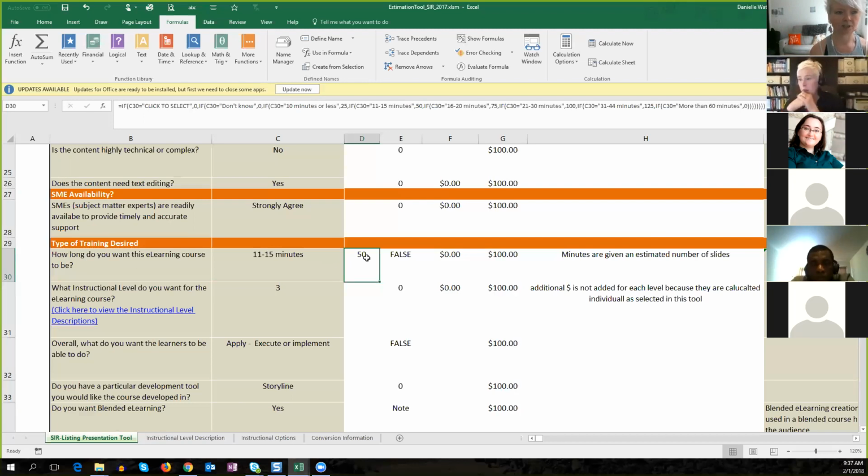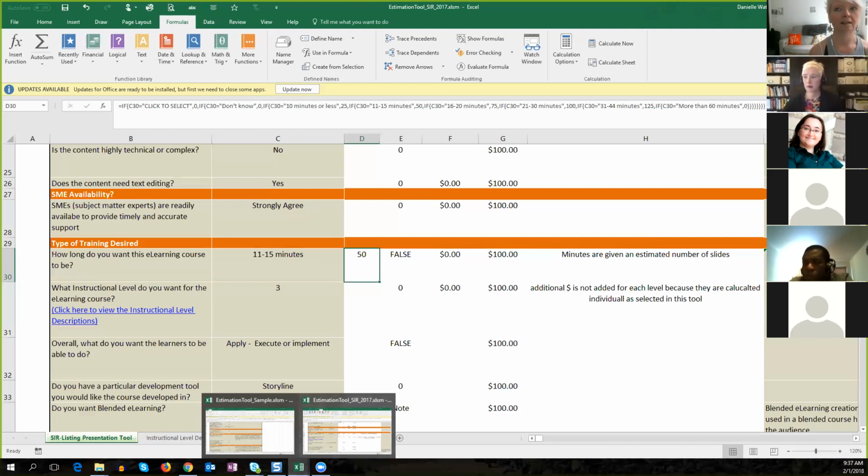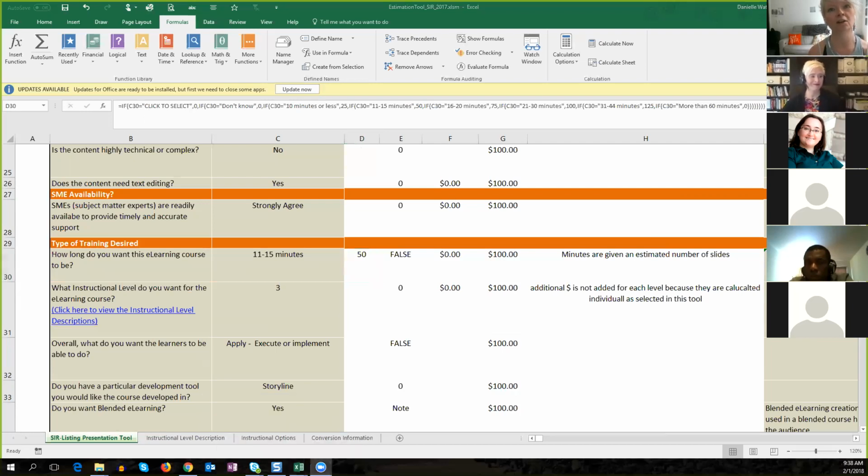Like I mentioned in the group chat, as often as I can, I'd say probably 70% of what I do is fixed price. But I had a new client pop up maybe in December or so, and one of her colleagues said he will go through like 50 iterations. I was like, oh, well, that's important to know. So you get 2 rounds, and then after that, it's an hourly rate. So you can make as many changes as you want.